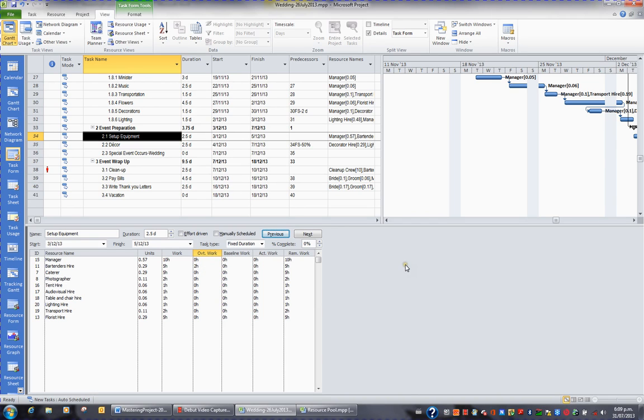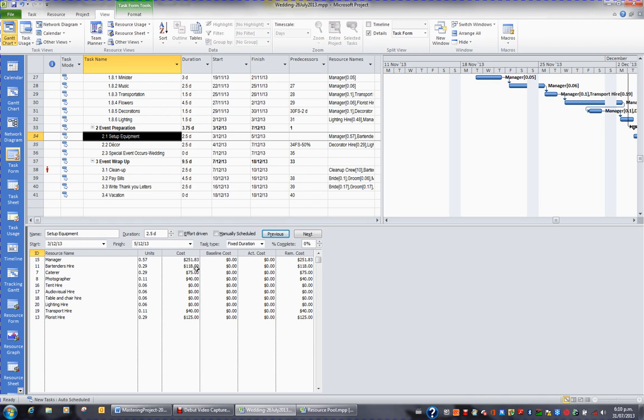So if I then right click this blank part of my screen and I switch back to cost, I expect a cost increase. And I have a cost increase from $90 to $118. And that is because of the 5 hours. Now 3 hours are standard out of those 5 at $18, and 2 hours are overtime, which is $32 after the 1st of the 12th. So 3 hours at $18 and 2 hours at $32 cost me $118 after the 1st of the 12th.